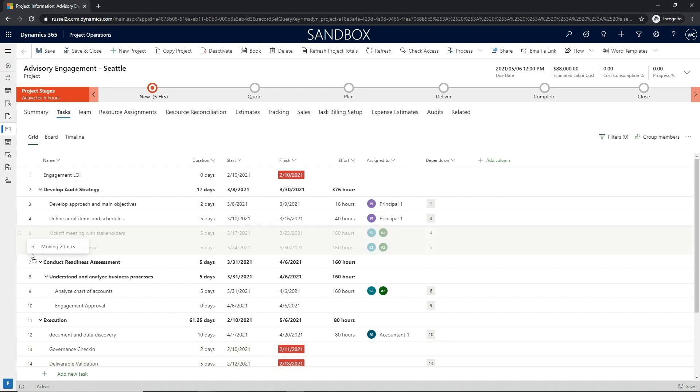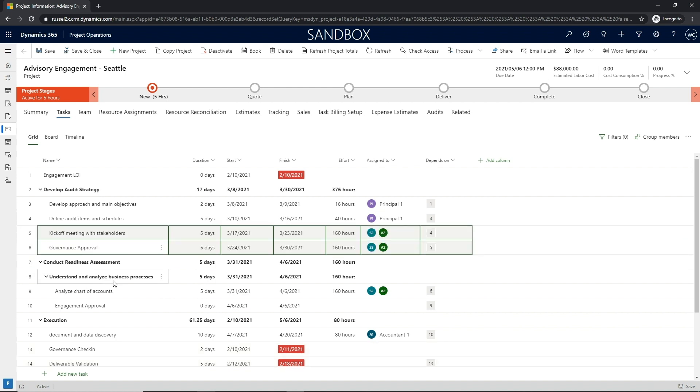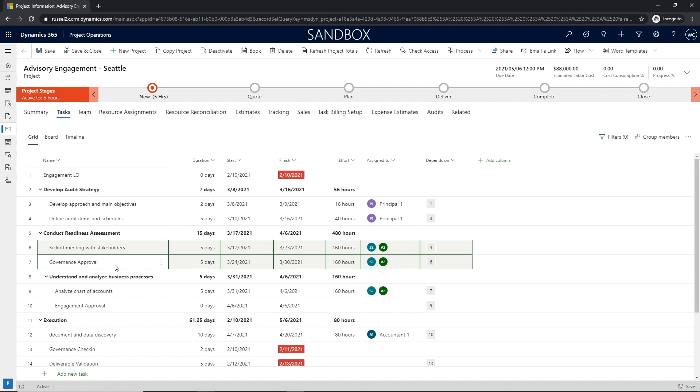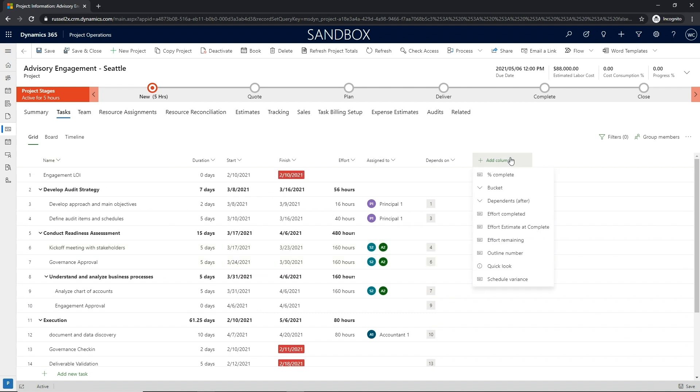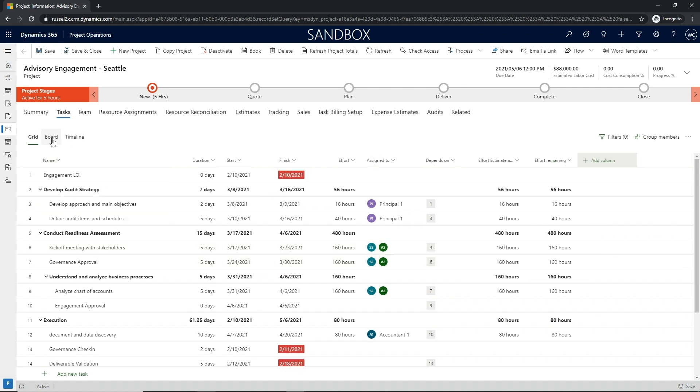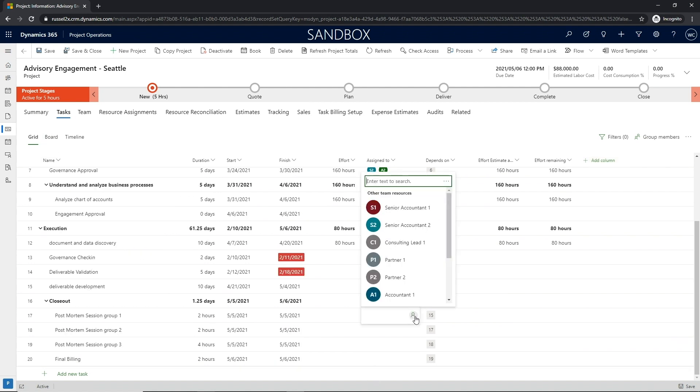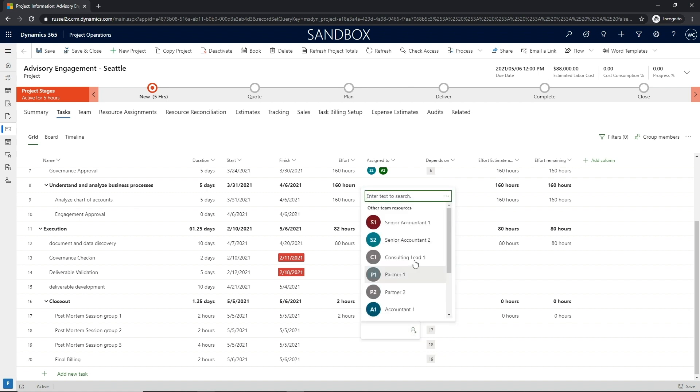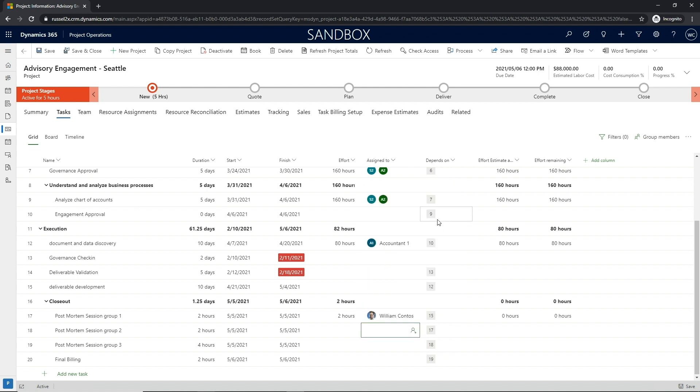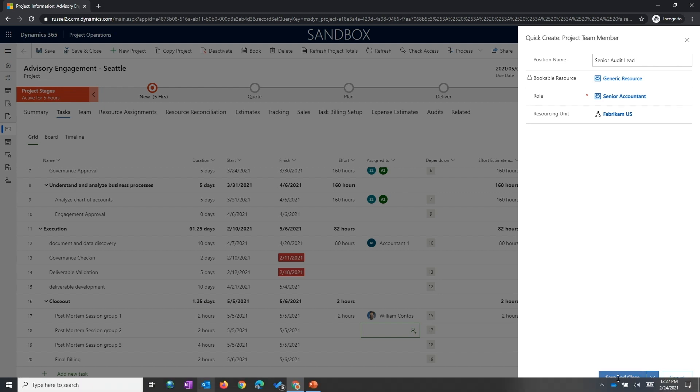When assigning resources, Project Operations affords project managers the ability to define named resources as well as placeholder resources when estimating the project. The named resources can be determined at the time the project has been created or booked later, as will be covered in later sections.